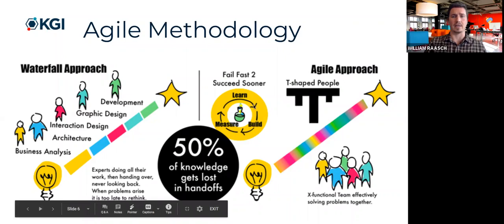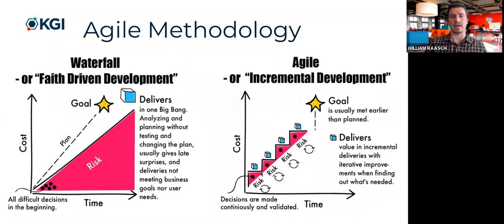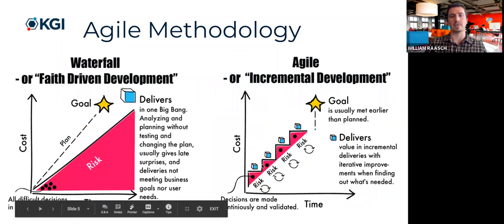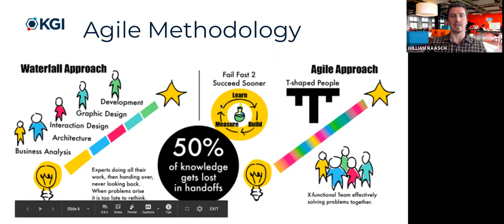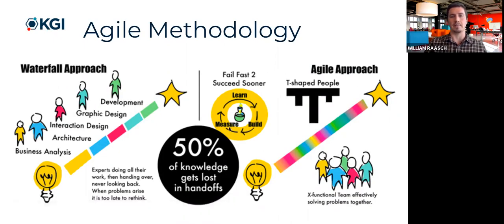Finally, the other concept here, and this badge is a good fit right here. So you see these risk cycles. With each iteration, you have your own risk cycle. And here you can see that cycle of, let's measure how the customers react to the previous iteration, and learn from those measurements. So measurements like how much time they are spending on the software, how many mistakes they are making, how positive is their user experience. And then after learning from that, you build the next iteration based on that, right?